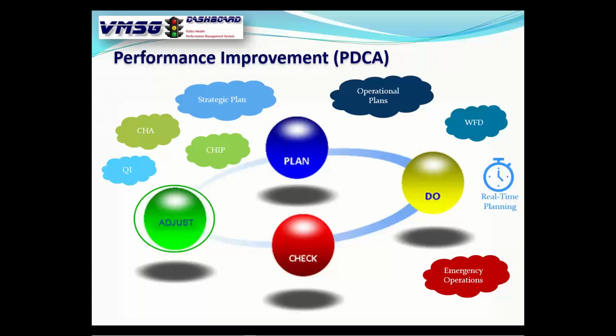The other side where we're trying to contact tobacco vendors may be the same issue. It may just be that maybe we've lost resources, don't have the people to go out and contact them. So maybe we get more resources to do that, or maybe even outsource that to somebody. So that's the adjustment to the resources to get to the plan.